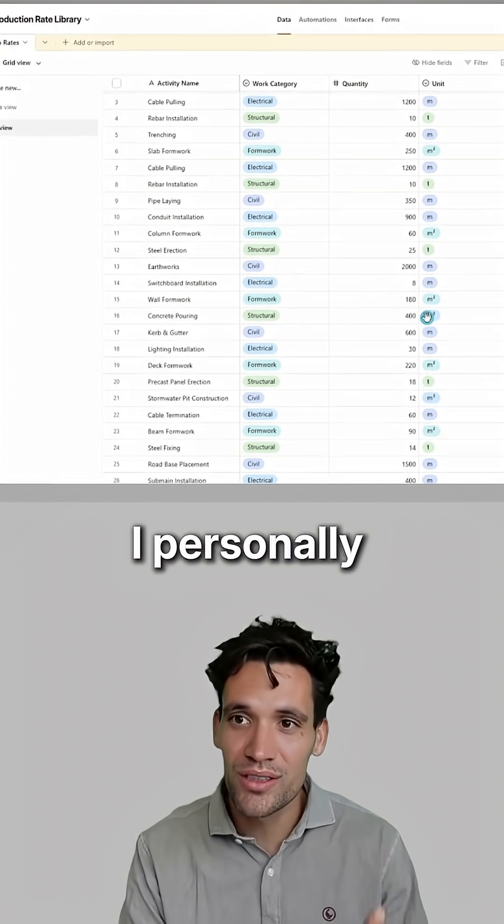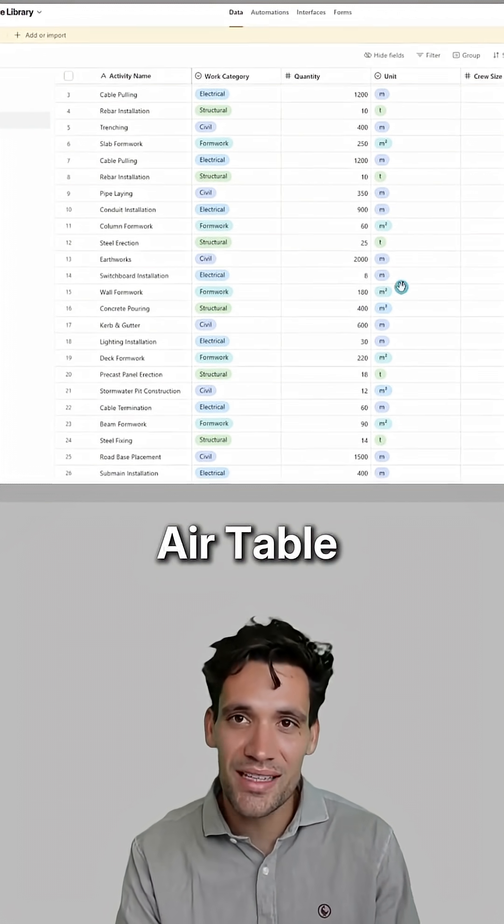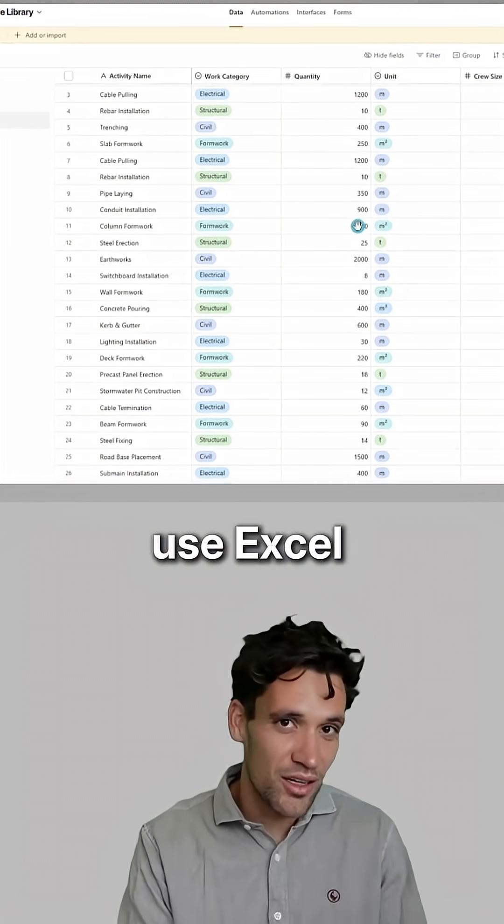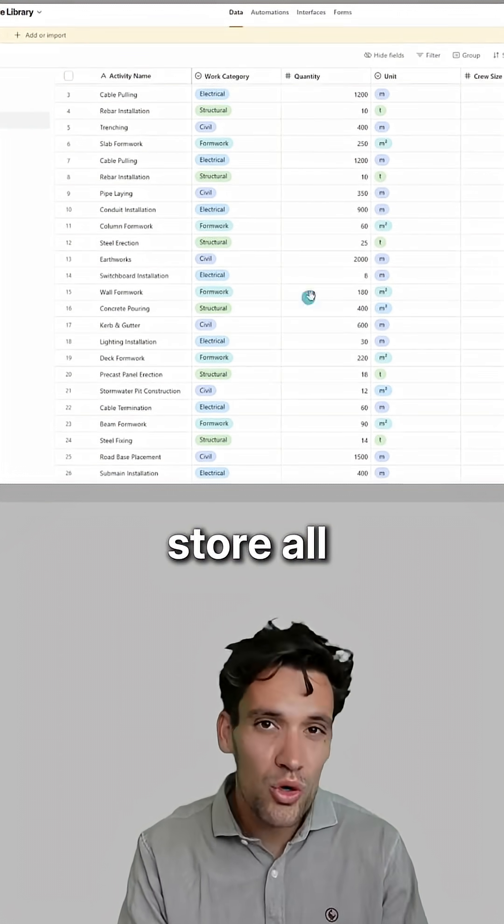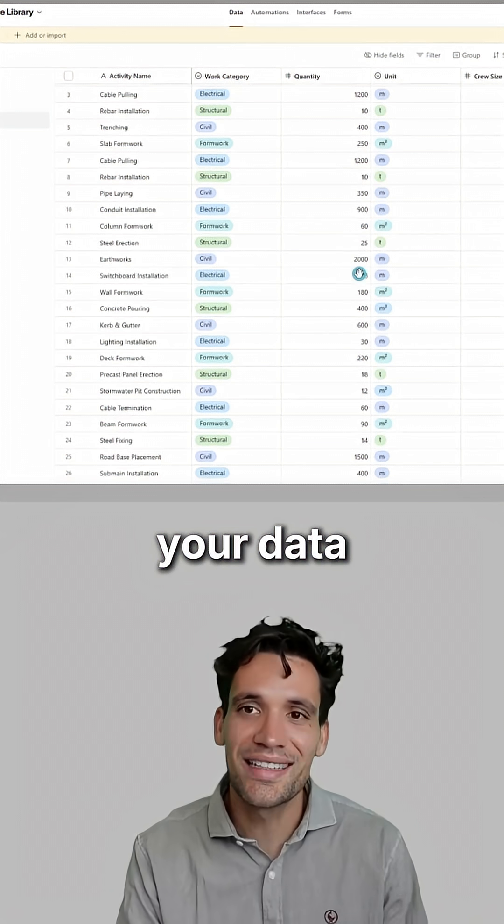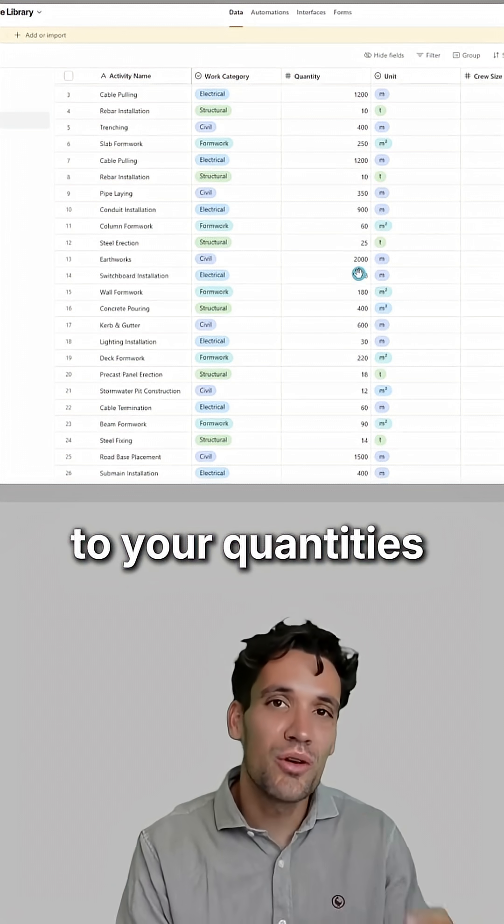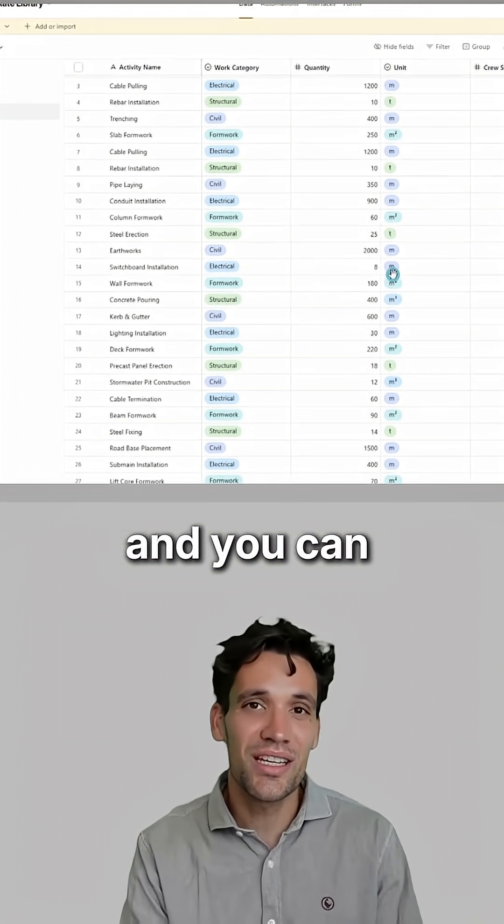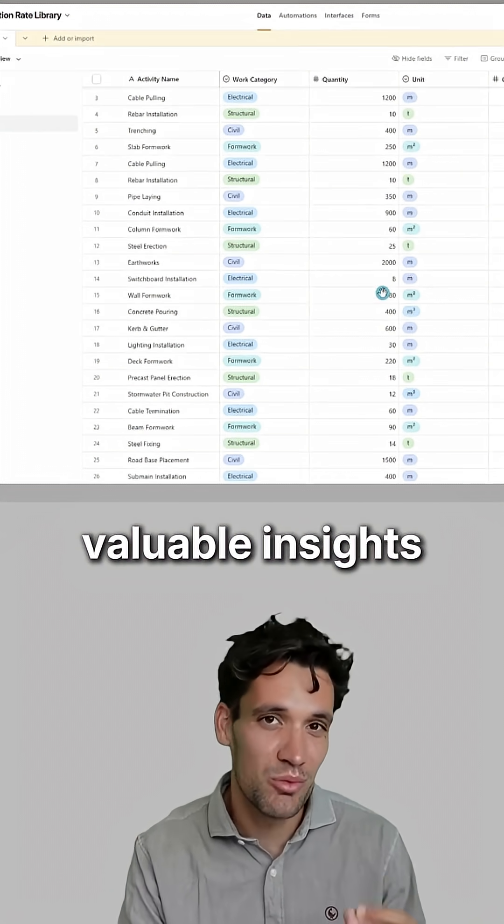I personally love using Airtable for this, but you can use Excel as well. Store all your data and link it to your quantities and other items like project duration and you can get some very valuable insights.